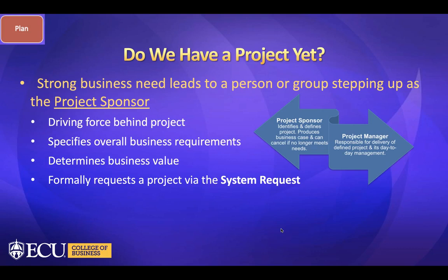What happens is, for example, with a company, we had a project sponsor that had led one project, and what happened is over time the project became more and more expensive, and so a lot of managers said this is too expensive. We had made the business case before, but it cost more than we had estimated, so let's kill this project. So how powerful the project sponsor is important in this case to make sure that the project doesn't get killed, and that it gets more resources and continues to be done. So project sponsor is crucial.